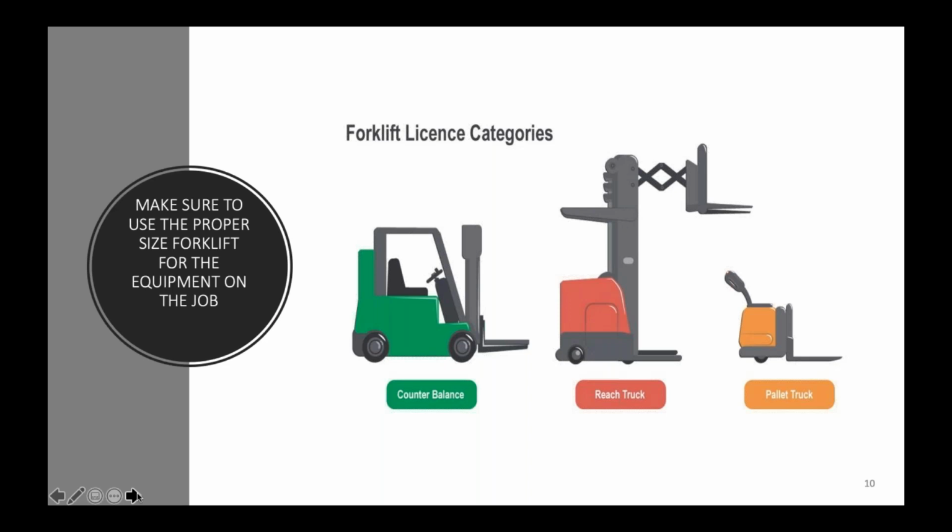And when it comes to desiccants or anything with a large footprint that's over 4 foot by 4 foot, when they tell you how much weight these lifts will pick up, they're looking at a 4x4 skid. But if you get a piece of equipment that's 13 foot long and 4 foot wide, then you're going to have to severely increase that.